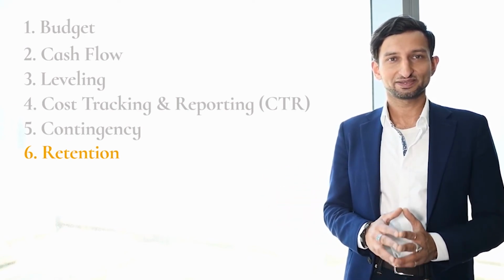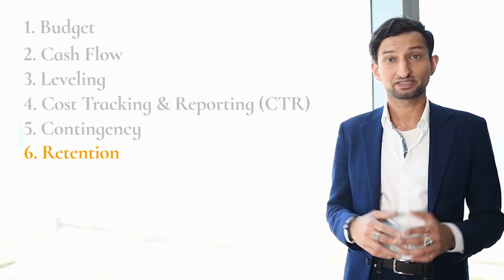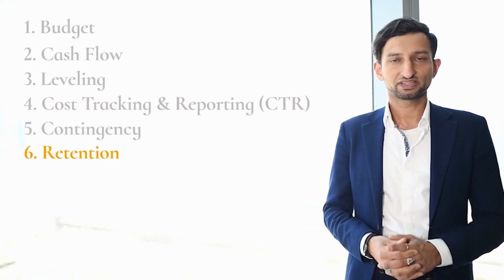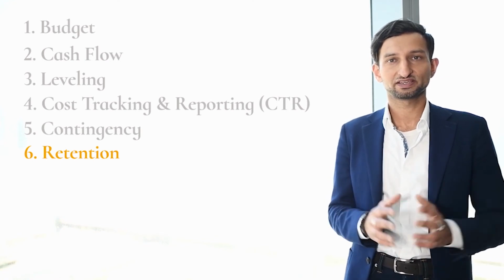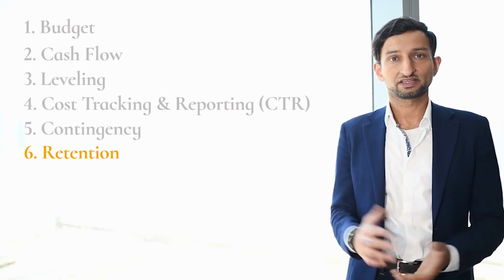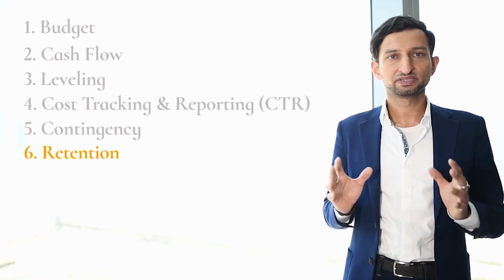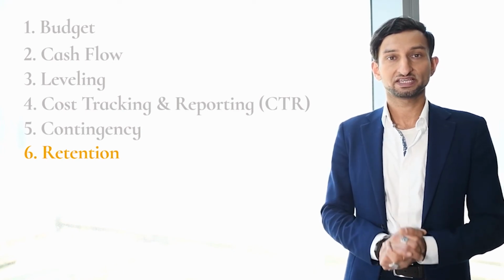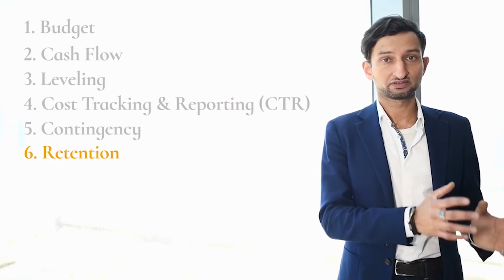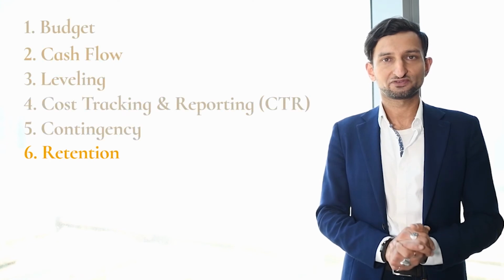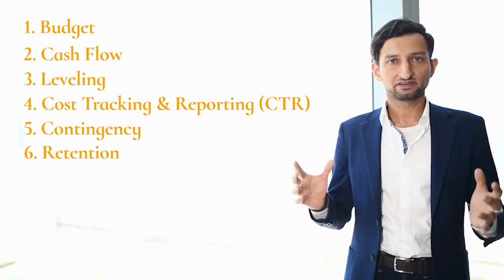Retention is stipulated as part of construction payment standards, and we do not recommend working with suppliers or vendors, as in companies you're buying products from, without holding retention on the projects. We typically recommend holding a retention of 10% on most vendors, and this is standard, unless they are signed off and completed with the punch list and signed off on the project. The retention can begin to be released once your project has achieved substantial completion. However, a 5% retention should also be held until you reach final completion, at which point it can be coordinated for a staggered release, first down to 2 or 3%, then to 1 to 2%, and then finally to 0.